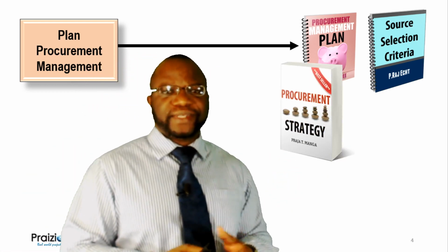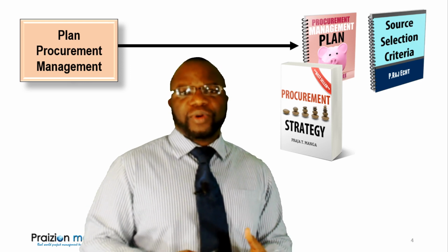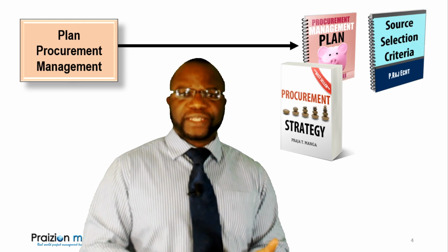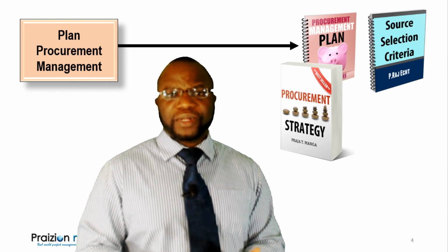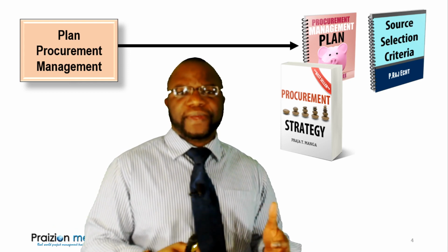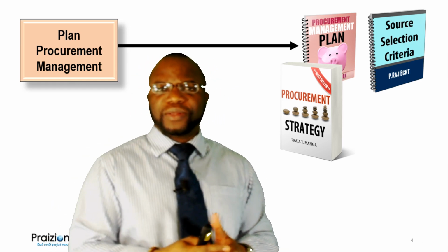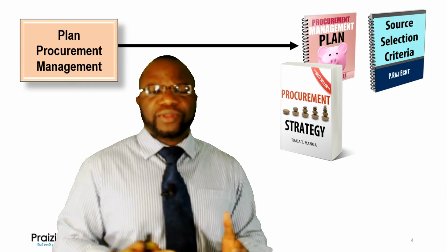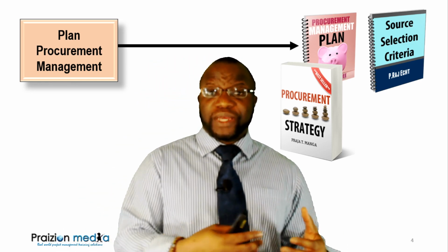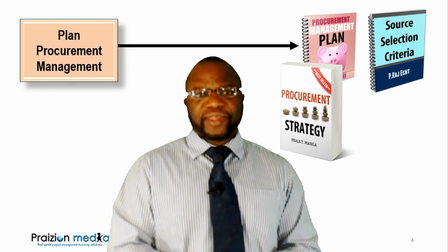The procurement strategy goes into further detail about not just the contract types, but really the vehicles that you will use. Will it be a build, own, operate, transfer? Will it be a design build? Will it be a design bid build, a DBB? Or in the case of administrative projects that are not construction, how will those be? Are we allowed to have a vendor in between us and someone else, or is it just us and the customer? And things such as that.